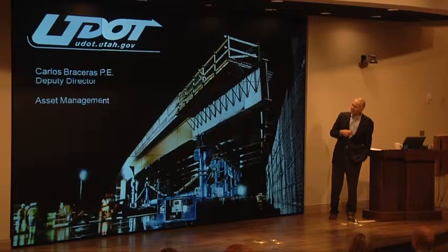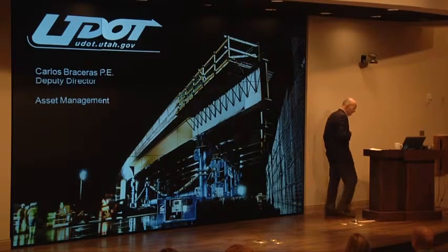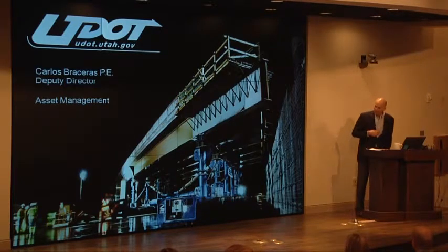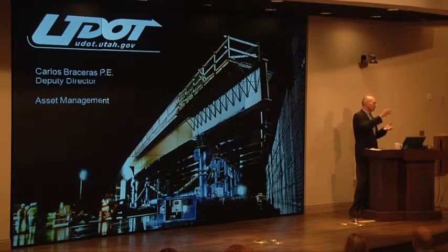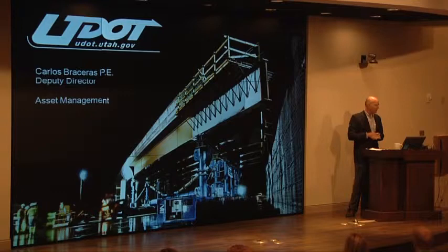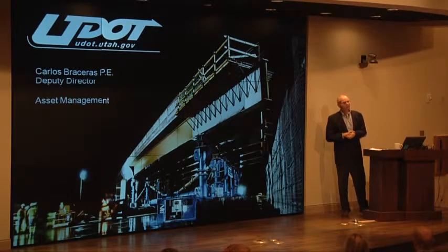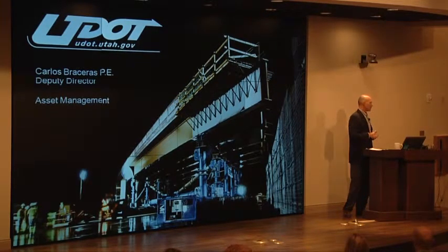This is a bridge move that we did on our I-15 rebuild job. We have an I-15 core job going in Utah County right now. For those of you that don't know Utah, it's the county just below Salt Lake County. It's a county of about 500,000 people, and we're rebuilding I-15 through this section. We're doing it in about 2.5 years. It's a $1.725 billion job. And they are rebuilding the entire interstate without taking away a single lane of existing capacity.